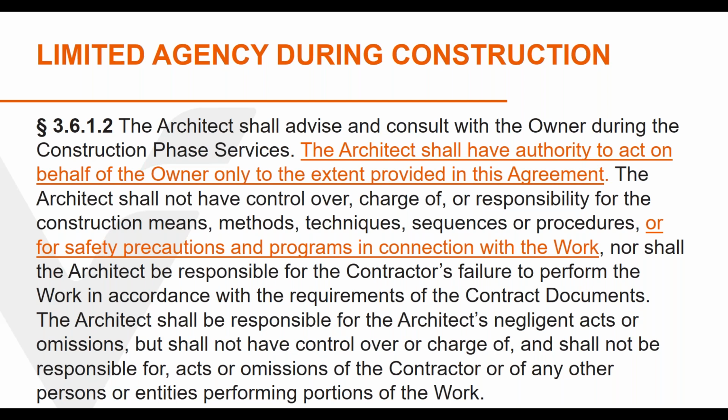The disclaimer language for site safety, the safety precautions and program language, actually was added in the early 1960s in the AIA documents, mostly on the advice of Vic Schinner, the founder of our program. He was the insurance counsel for the AIA documents committee at that time. It is of critical importance, and many court cases have exonerated architects, or in the case of EJCDC language, engineers, in worker or bystander injury claim situations because of this disclaimer.